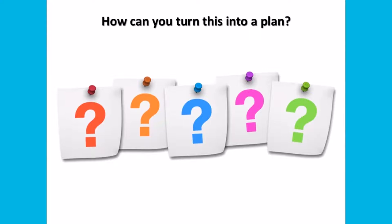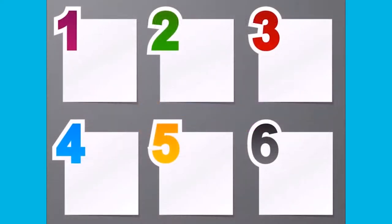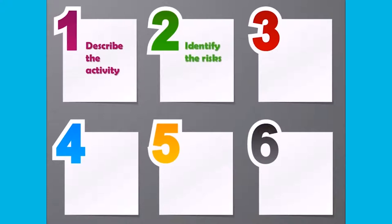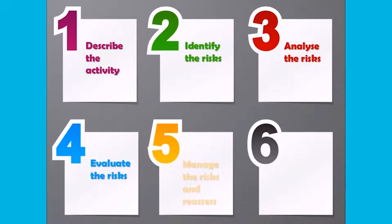So how do you practically do this? How can you turn this into a plan? All you have to do is consider six steps for each activity or event, which are: step one, describe the activity; step two, identify the risks; step three, analyze the risks; step four, evaluate the risks; step five, manage the risks and reassess; and step six, review.